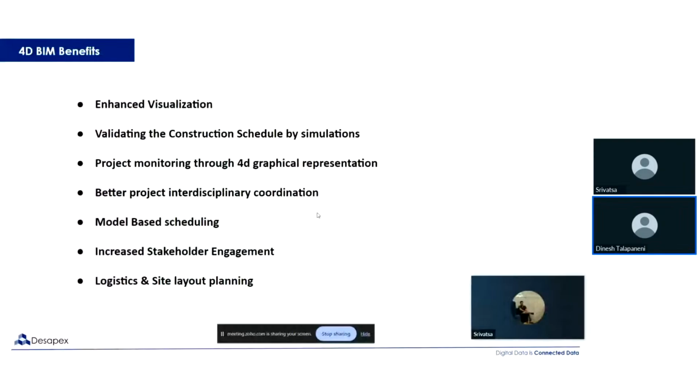this is how it is going to work, and if there is any issue, he will highlight, okay, this particular task has to be finished before starting something else. All this, when you're running the virtual construction simulations, will engage in all these discussions and give more realistic timelines to your project.